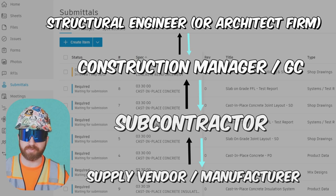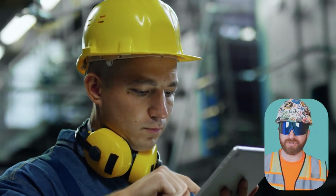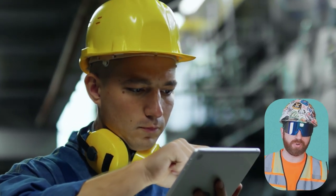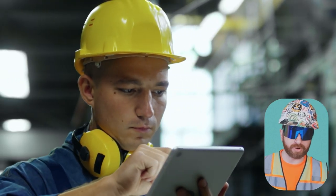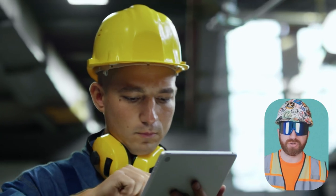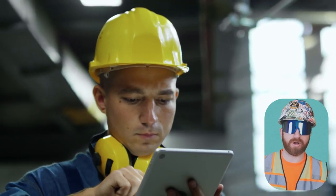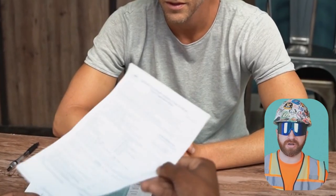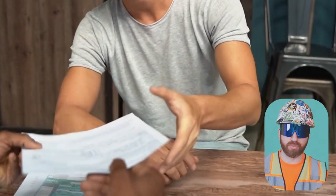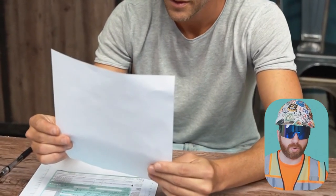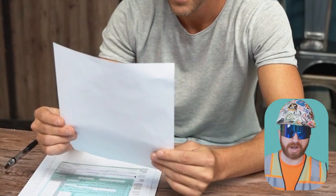As you can see, it trades hands a bunch of times. As these submittals are trading hands, there's usually a requirement to stamp them — putting your approval or seal on the document saying that you reviewed it. This is usually a requirement of the specifications, and an architect or engineer can reject it if they don't see an approval or review stamp from the construction manager or general contractor.